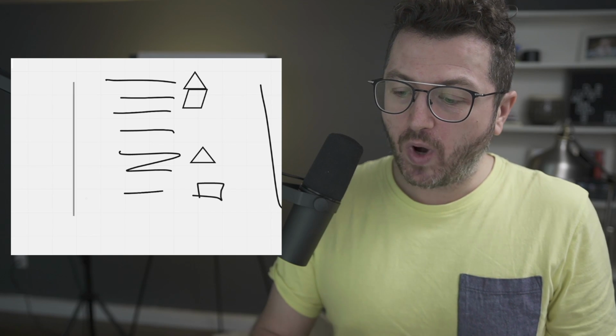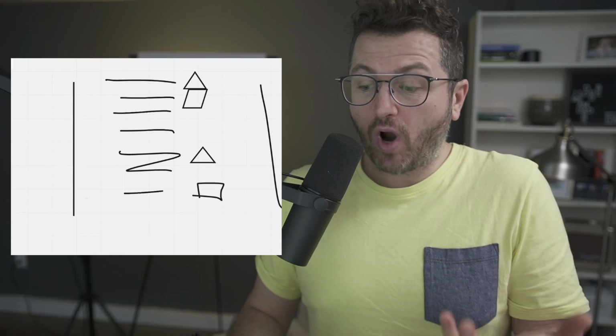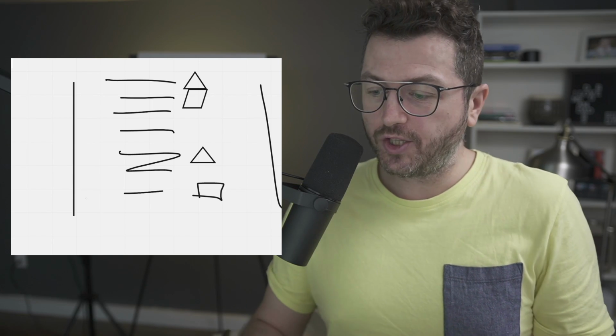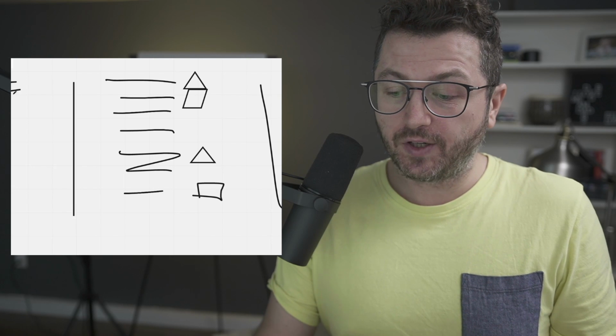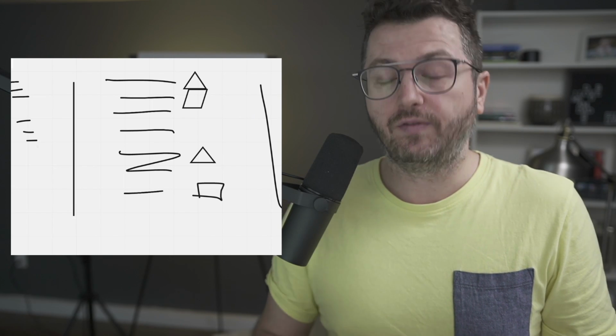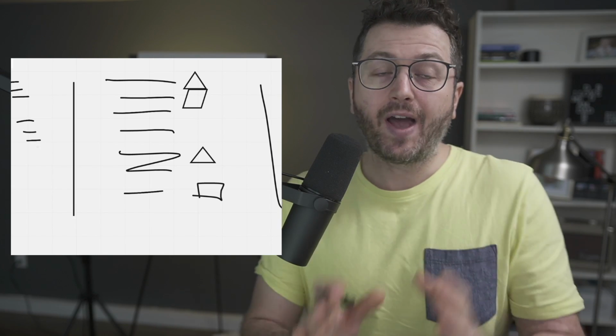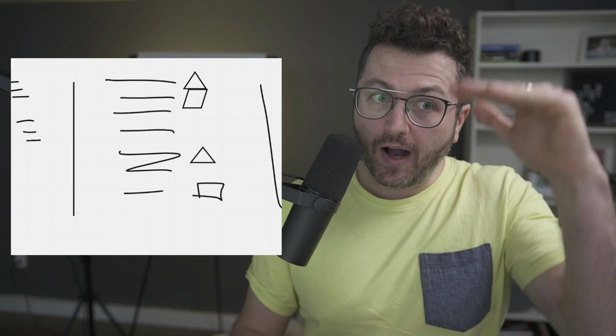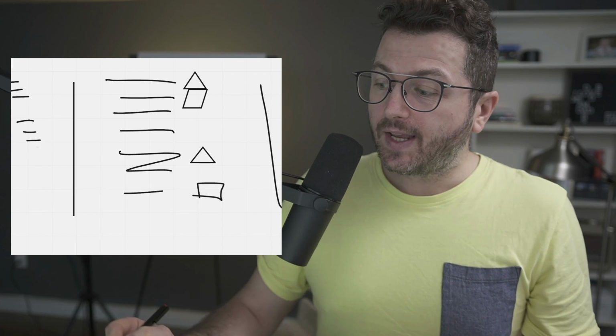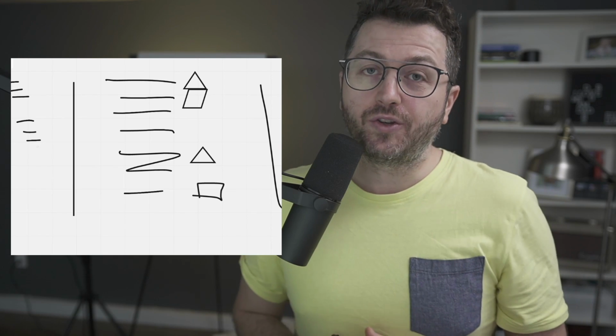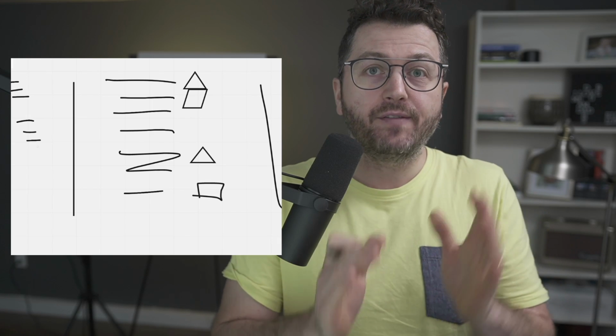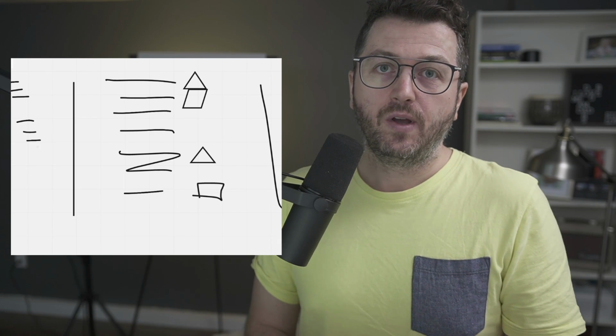If on the other side you want to look at a specific project and see the progress of that project, the same thing. You're going to run a filter for project 1, and you're going to run a filter for project 2. This way you have the master list of how things need to progress, and you can filter based on what your interest is. And every person, every SME, knows exactly what they need to do.